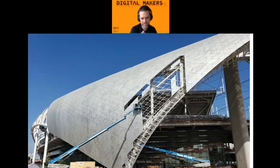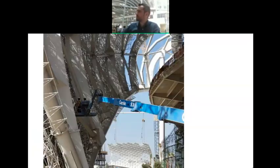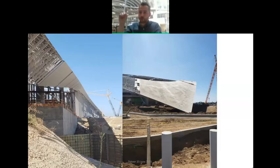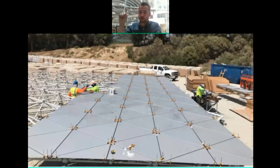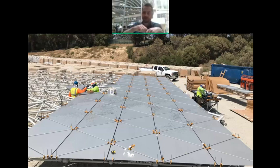And that's where the early collaboration with the installer comes in. Let me go back to this photo. We worked with them early on sequencing, so the way that they were going to break up their space frames, and then how they were going to install them, like in the rows. Then working all the way back up to our programming step, we're releasing machine files in the order that the installer wants in the field. So from the machine file release, it has to get punched, go to get anodized, get formed, and shipped to the site.